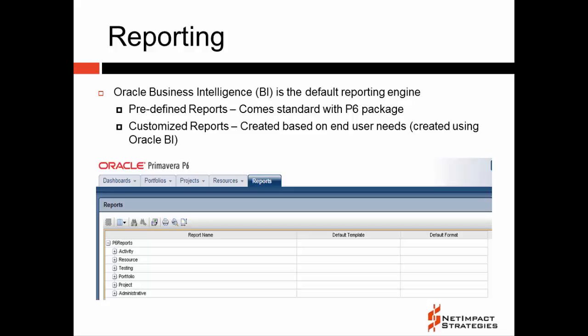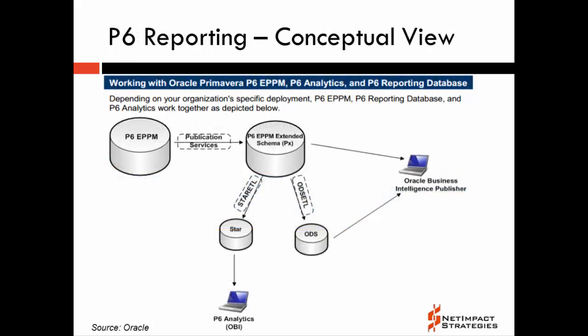Using the custom reporting database gives you the ability to aggregate and manipulate data in ways that are not possible within the native P6 functionality. The reporting database is an additional schema that is created in the current instance, giving the end user a set of tables designed with query writing in mind, making for a much less painful experience when trying to pull information for a report.